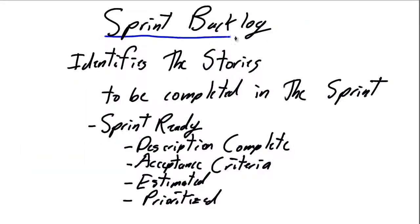The Sprint Backlog, typically associated with Scrum project delivery, identifies all of the stories, the pieces of work, the business functionality that's going to be delivered in a Scrum Sprint in a two to four week development cycle.